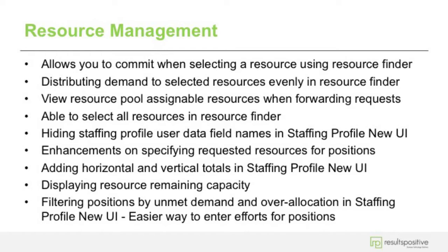Again, using the resource finder icon when selecting resources, if you had, say, 3 resources in the previous version, it would allocate all the hours to the first resource, anything left over to the second resource, and again anything left over to the third. Now they just evenly distribute the hours between the three resources.